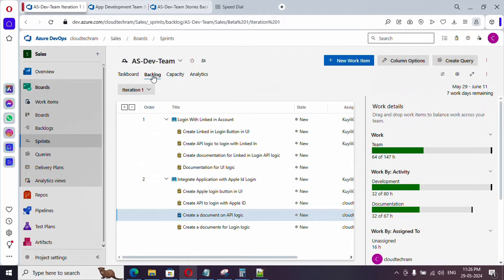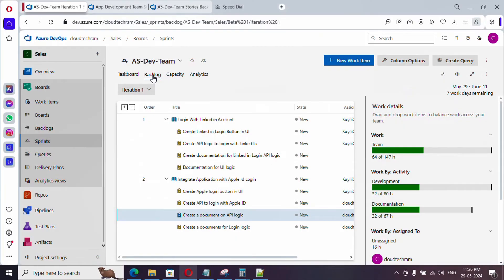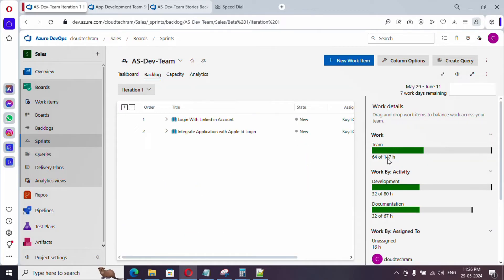After saving, let's go back to the backlog. Working days remaining has updated to seven — previously it was 10, and it got updated based on the team days off. Under capacity, we now have 147 hours available but only 64 hours of tasks, meaning team resource time is not being utilized — it's not even close to 75 to 80 percent. We have 80 hours for development based on team capacity and 67 hours for documentation, but we have only 32 hours of work assigned.